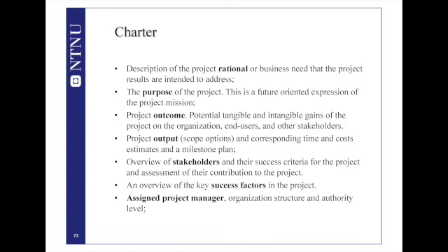And what are the negative gains? Because this is a potentially valid question. What are the potential negative gains? You define the potential gains in order to force them through, and you define the potential danger or potential negative aspects in order to address them as risks.